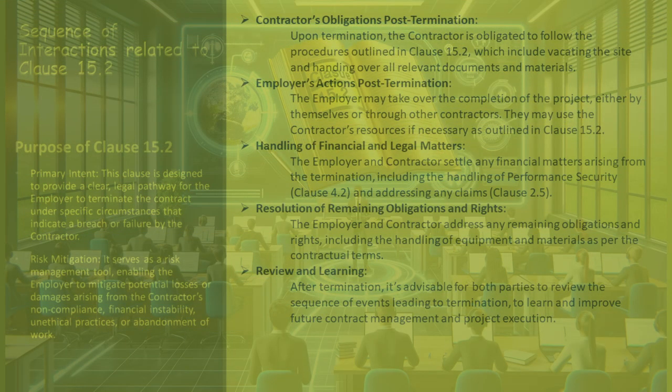Following termination, the contractor must comply with the procedures specified in Clause 15.2, which involve vacating the site and submitting all pertinent documents and materials. Post-termination, the employer may undertake the project's completion, either independently or through other contractors, and may utilize the original contractor's resources as mentioned in Clause 15.2. Subsequently, financial issues including matters concerning performance security (Clause 4.2) and any claims (Clause 2.5) are settled between the employer and the contractor.